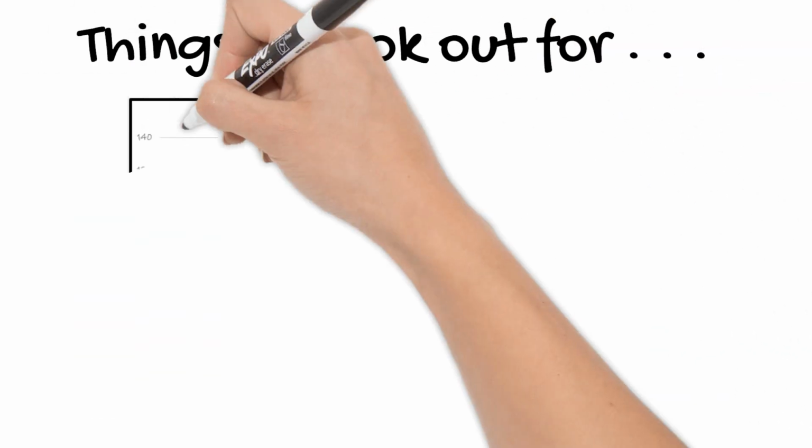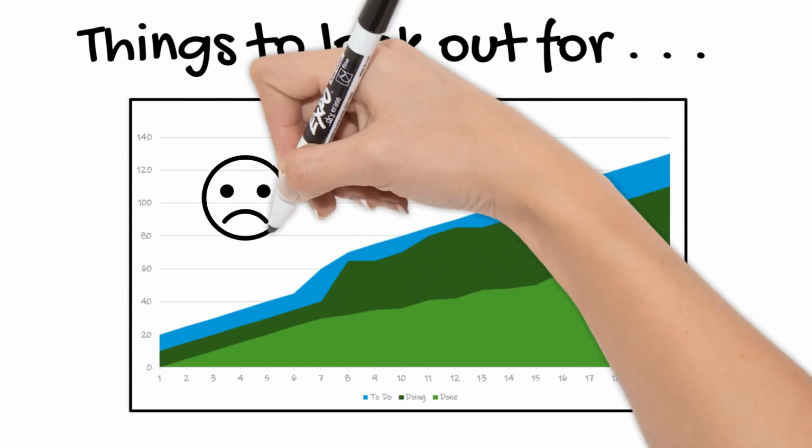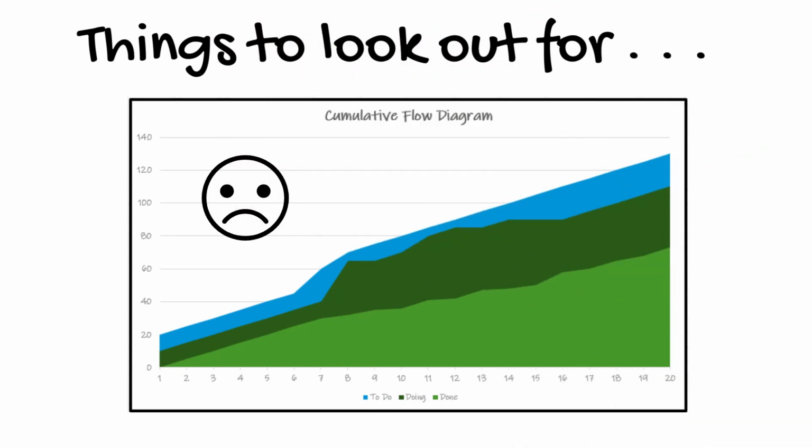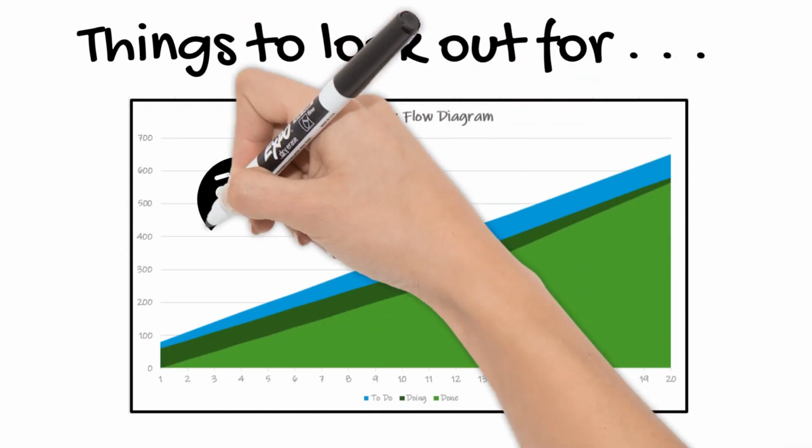If the bands widen too quickly, the number of work items entering a particular stage of the Kanban board exceeds the outgoing number. In other words, your team has more work arriving than it is completing. With too much WIP, your team will face a bottleneck. To avoid delays in work delivery and decreasing throughput, you should focus more on completing work in progress before starting new work.